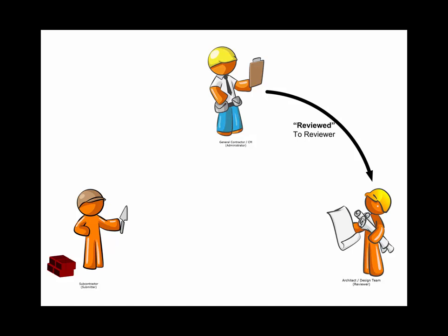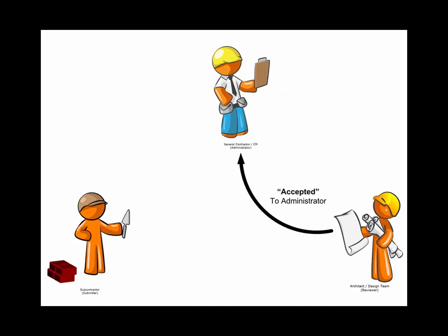If necessary, the design team member will add markups or comments for any changes required. Much like the general contractor, the design team member is likely to apply a stamp to the reviewed documents that indicates the status of the review. Since this is a legally binding document, it is likely that the design team member will apply the stamp to every page. When the design team member has completed the review, they will return it to the general contractor or construction manager.